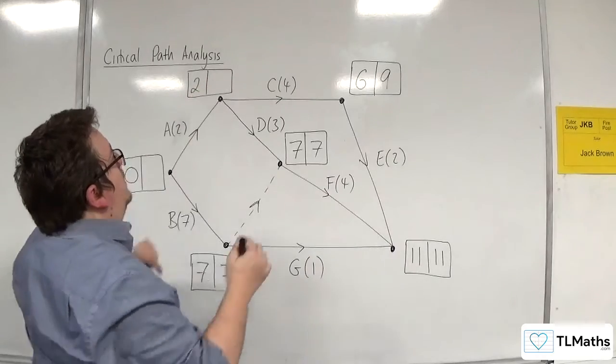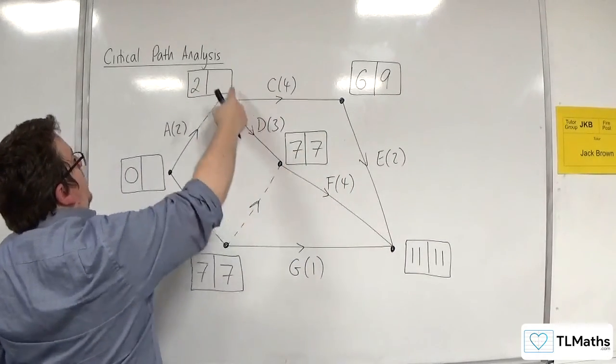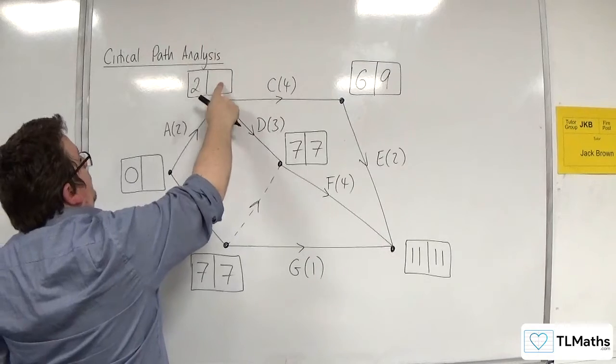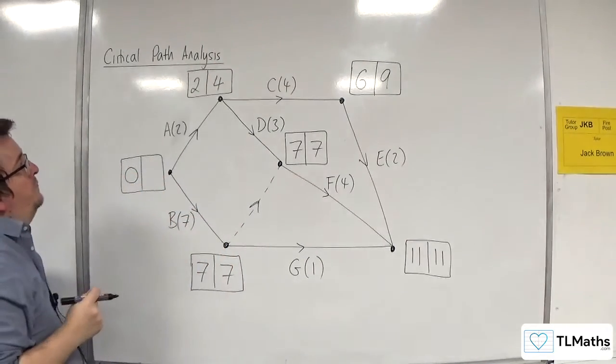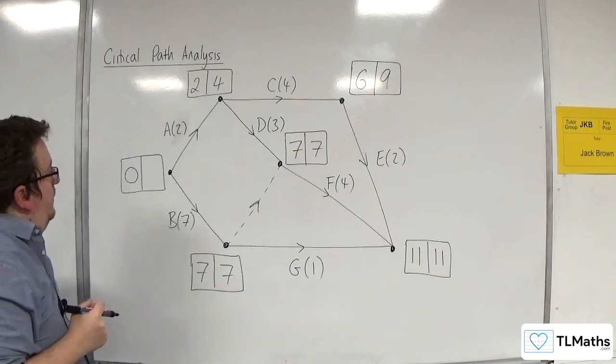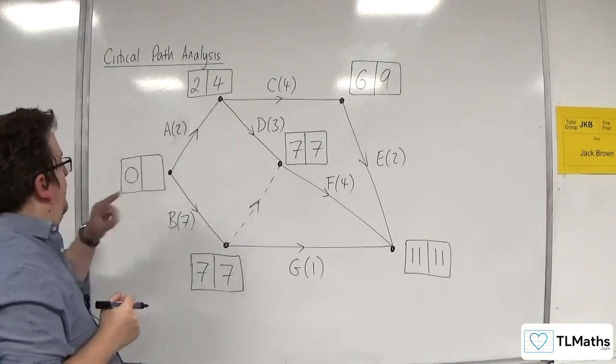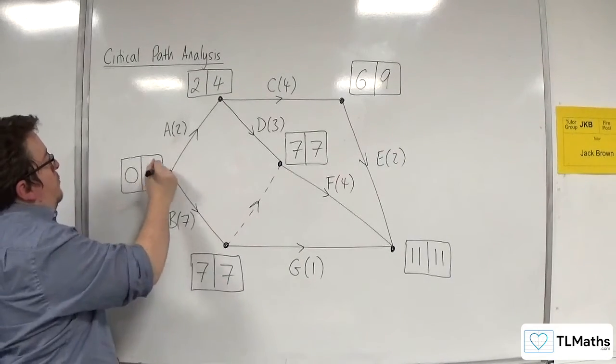So for this one, we've got nine take away four is five. Or seven take away three is four. So this one would need to be four. So then for this one, we've got seven take away seven. Or four take away two. So zero.